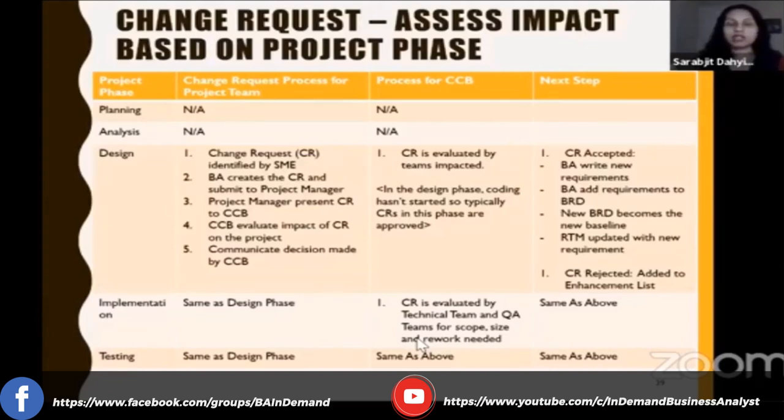So when a change comes in, that's actually a really, really good question. Thank you for asking that. Let's say you first, as a BA, have to evaluate if this change that's coming in is in scope for the project. If it's not in scope, you don't even need to involve anybody in understanding the impact because it's out of scope, right? You just toss it out. But if the change request that's come in is for this onboarding screen, then you have to understand, based on where you are on the project, how much of an impact it is for everybody.